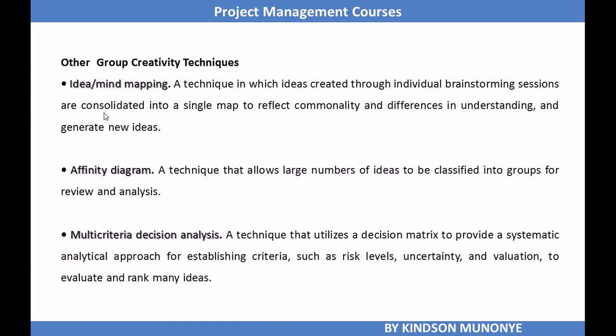Of course, we have multi-criteria decision analysis. This technique utilizes a decision matrix to provide a systematic analytical approach for establishing criteria such as risk level, uncertainty, and valuation to evaluate and rank many ideas.